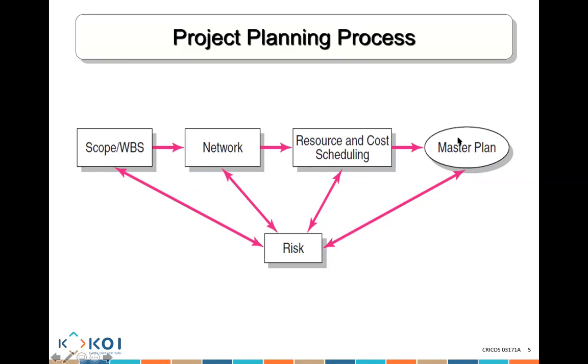Now, at all times, I'll also need to be looking at my risk, what sort of risk I have in my project, because any risk that you have will affect whether you can achieve your project within the right time and the right budget. For example, if you have an emergency like a COVID situation and everything stops and you are, let's say, building a construction project, then your time is going to be pushed and probably your scheduling is going to be pushed. The amount of resources available is going to be pushed.